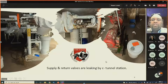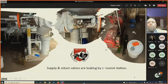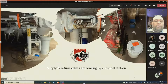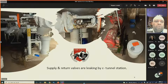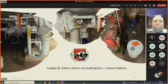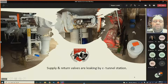In the C-tunnel at Proviso East, there is a glycol leak on the BNG pump and also on a large gate valve — believed to be a 12-inch valve. The work is manageable; they are working with Helm Group to develop a scope of work, procure the proper valve, and install it, with an update to come at a future facility meeting.